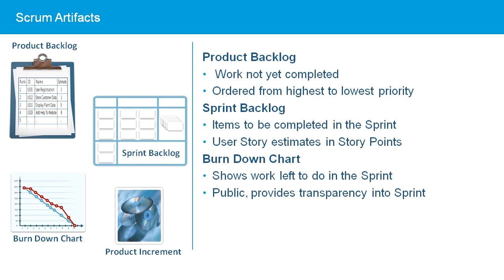The team's progress rarely matches the ideal guideline, but should show a steady burn down of the work still to be completed. If the Burndown chart shows the same amount of work needs to be completed over several days, it typically means that the team is blocked and cannot advance.